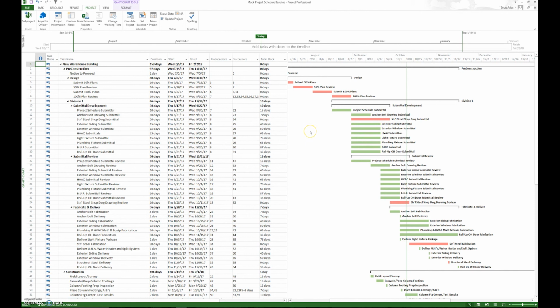whether it's red or green. What I didn't show you is that some people want to see the critical path that's not shown. Well, simply, I'll do this in the next videos, but by right clicking in the Gantt chart view, you can go to show and hide, and you can check mark critical. If I uncheck mark critical, you see it doesn't show the critical path. We want to show the critical path, so we go to show and hide and hit critical. And of course we turned off the connectors. That pretty much covers what we needed to go through for step number 2.